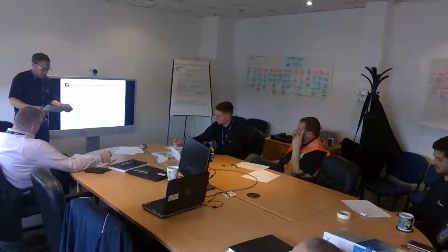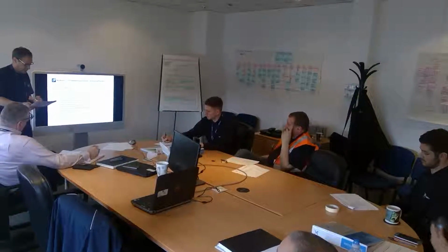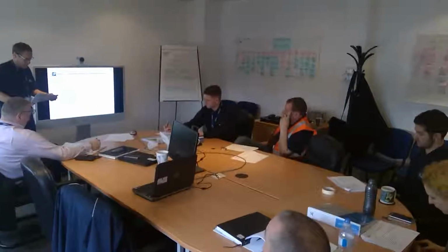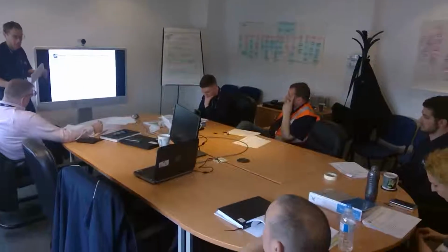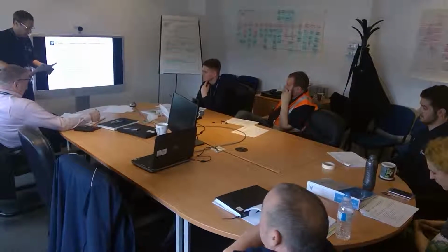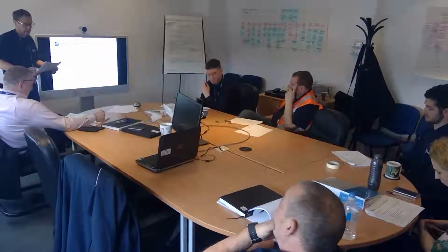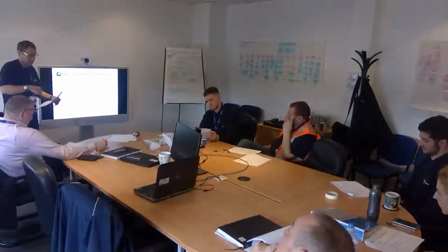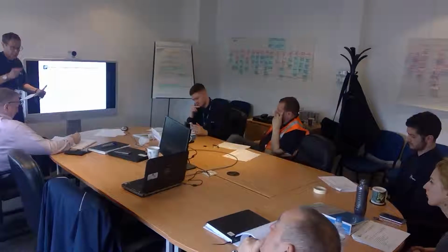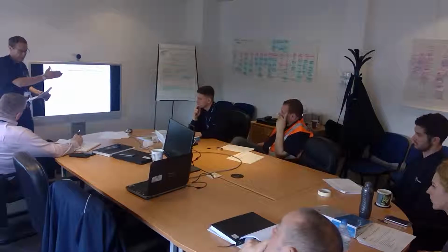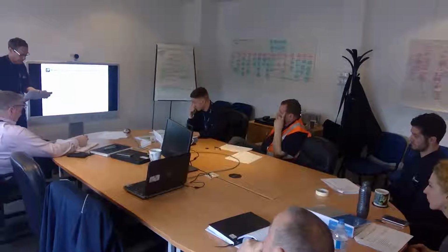But what we do need to do is cover health and safety issues. Everybody needs to understand what we're trying to achieve with the projects. We need a project overview. We need to be able to identify at an early stage what the project skill requirements are, especially for any welding procedures and things like that. We need to be able to identify tooling requirements in plenty of time. Obviously a lot of the tooling is supplied by myself, but very often I don't find out about it until the day we need it. And it's all down to this knock-on thing about not planning up front and not having the information up front.